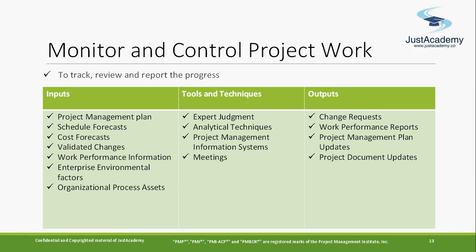The tools and techniques: expert judgment, and some analytical techniques, to see whether the project is ahead or behind schedule, or something needs to be taken care of. Use a project management information system, some MS Office or something to track it, or maybe a dashboard to track the activities of the resources, so that based on that you can generate a report. It will help you. Have a regular meeting with the team to get the status of the work and projects. That's another way to get the status and review the progress of the project.